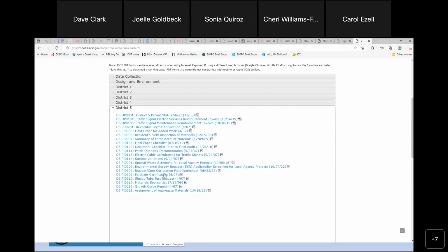If you're a consultant and you're doing, say, phase 1 work for them, there's a couple things they like to use. They call them special waste screening and environmental survey request screening forms. Those are very helpful to know what am I going to have to do. Fill those out, turn those in, and they'll give you more direction if needed. But you can see they've got different forms they like to use.